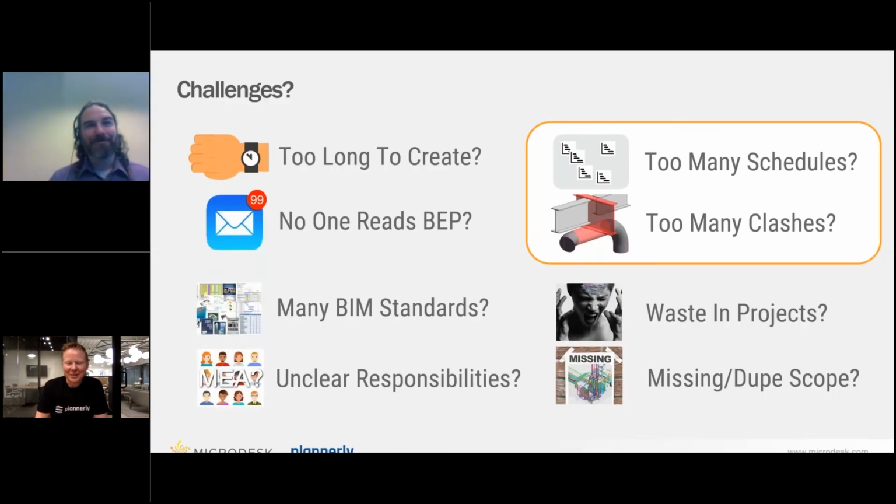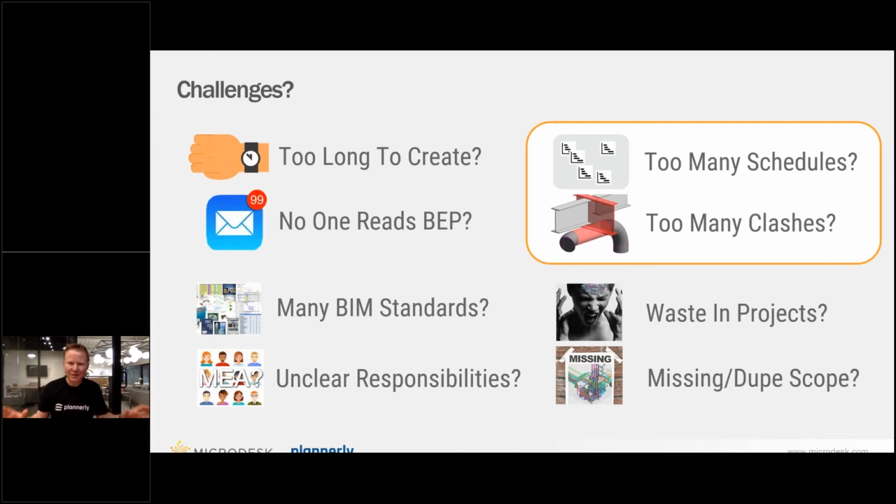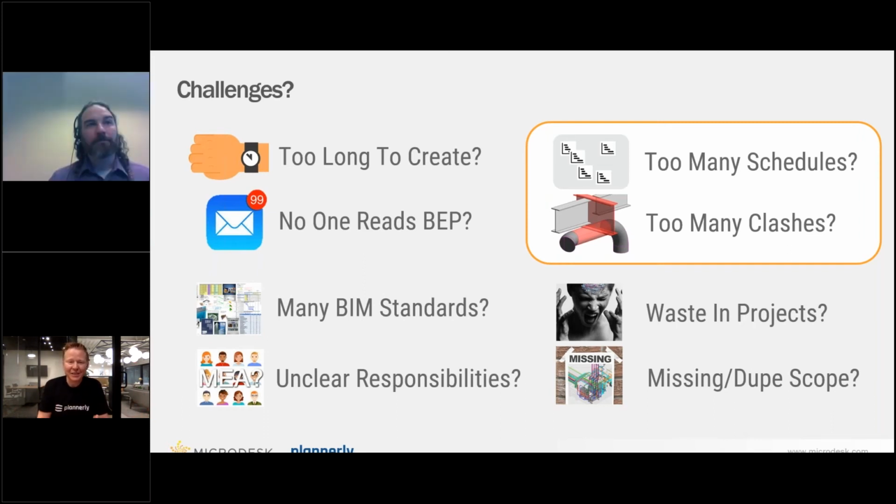And then we look at some of the other challenges that we said. So, okay, great. We've created a great BIM execution plan. We've created the perfect scope. But now when we go to execute the work, we are working independently in different places, different offices. What we are trying to do is have teams understand what other teams are doing, because there's such an influence between them. When I'm modeling, I'm not going to put in the audio visual in this room that I'm in until we've obviously set the walls, or we've set the ceiling, or we know exactly the location of some of the furniture.